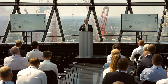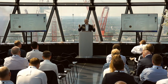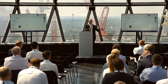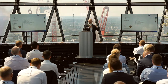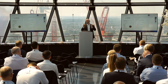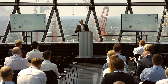Sorry, just to close out design review. When you have a commissioning management fee, probably 75-80% of that fee is towards the construction end of the project, and only 20-25% would be to the design phase of the project. But I would argue that you get 80% of the value on the design phase, because in design, you can manage quality and you can pick things up. In construction, it's a quality control game. You can only enforce the specification, right?